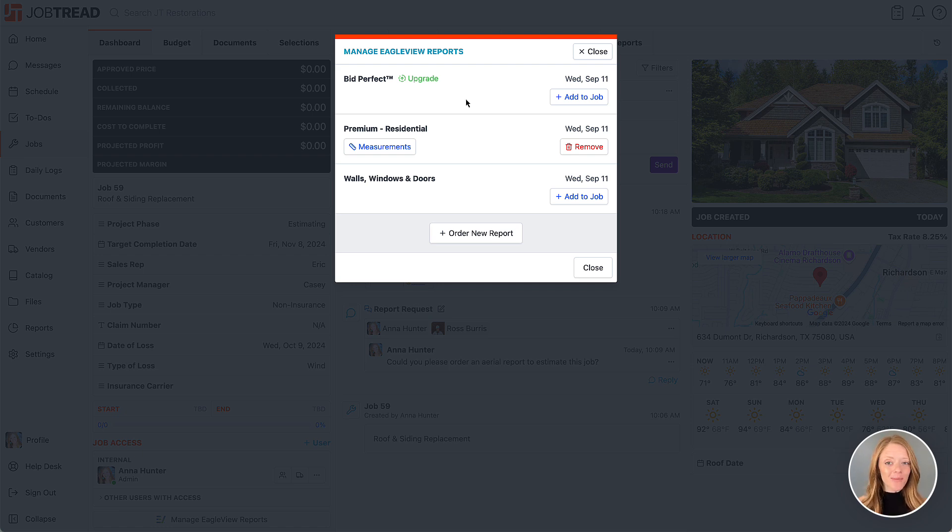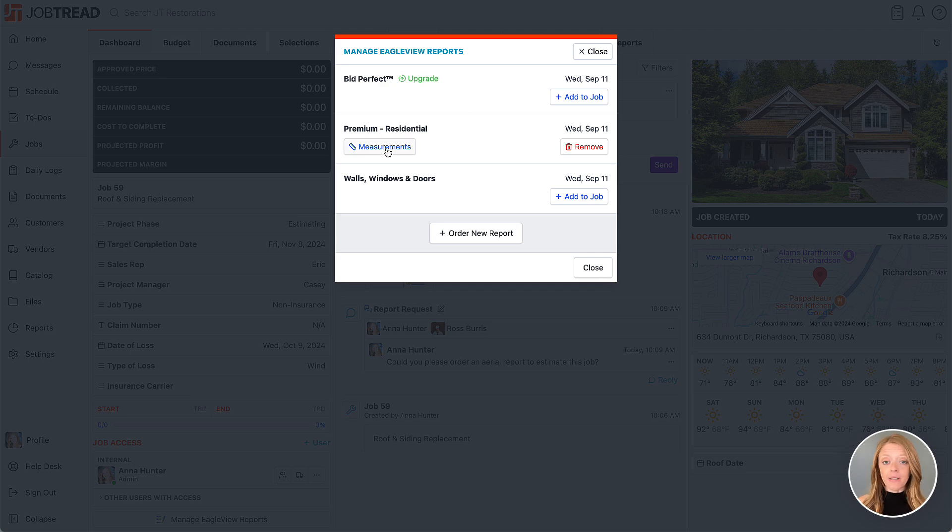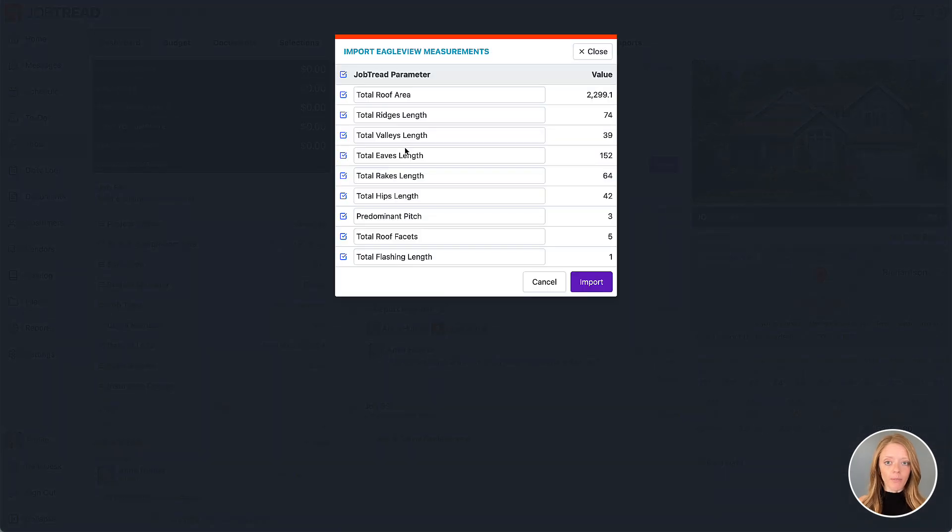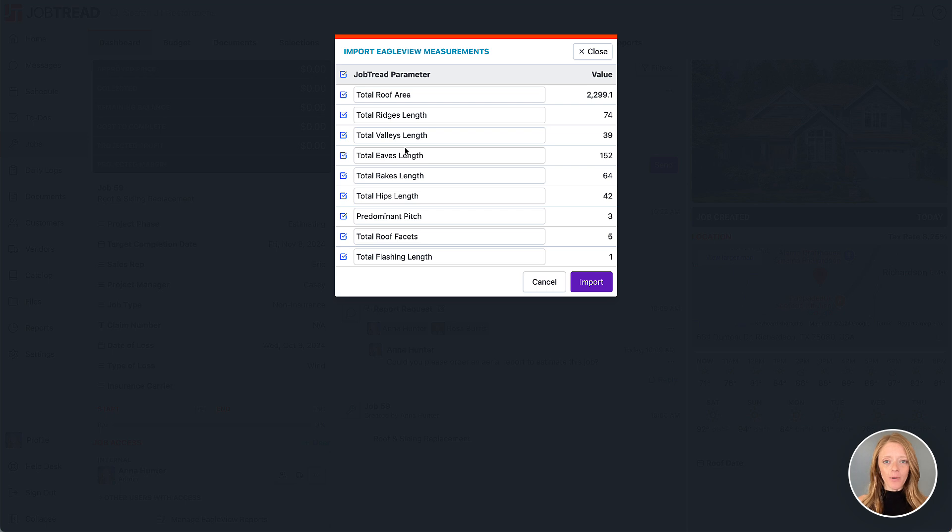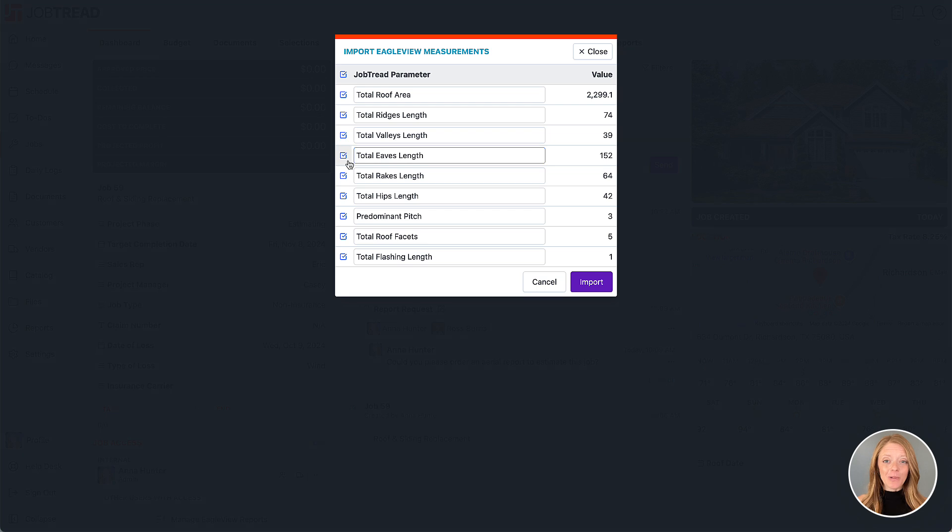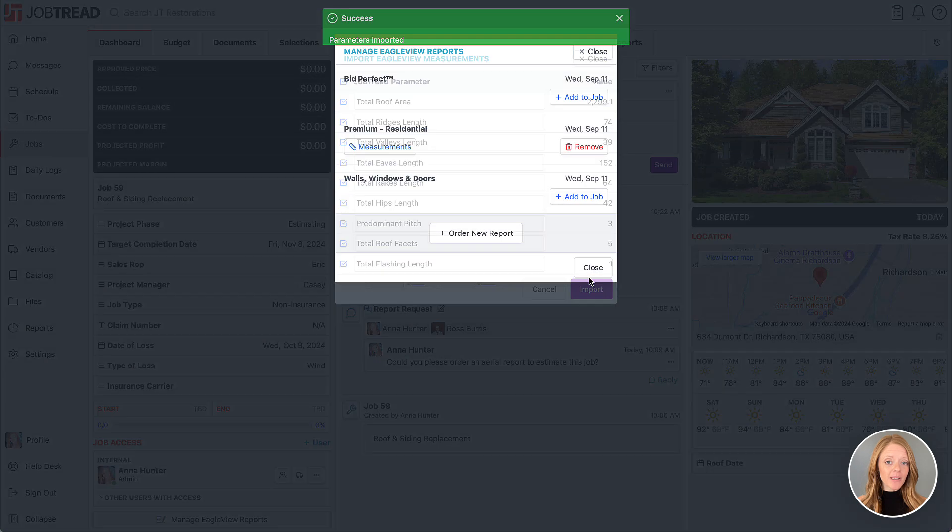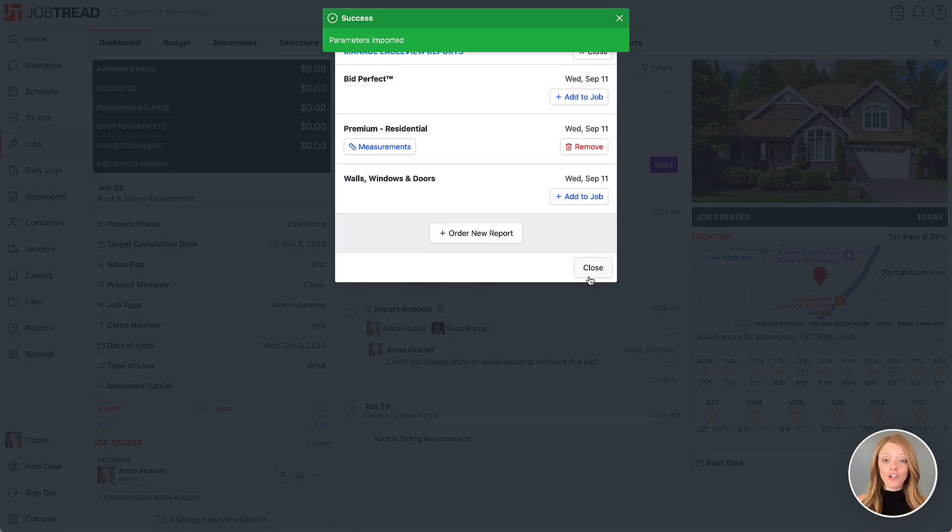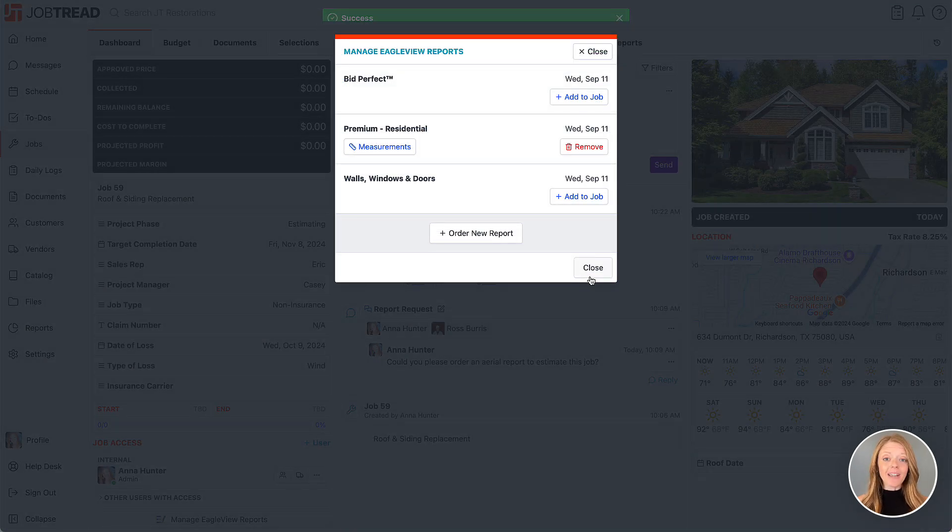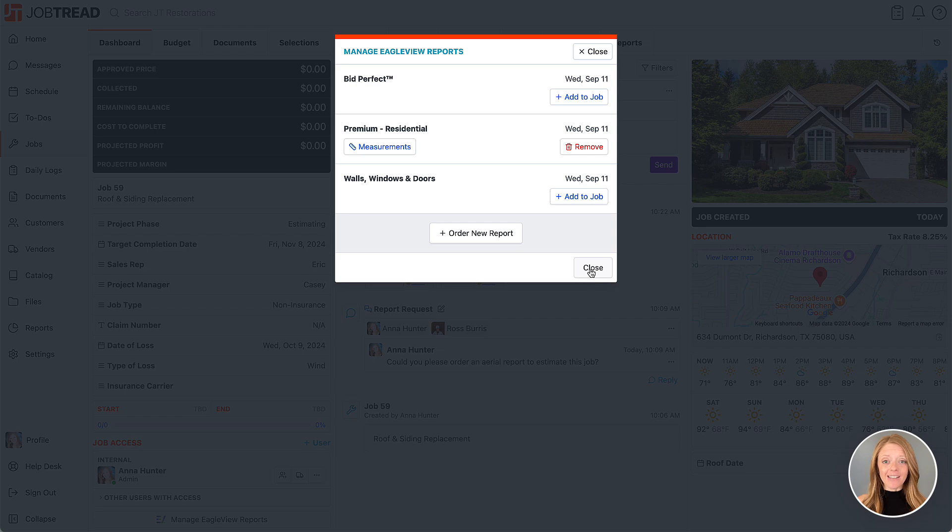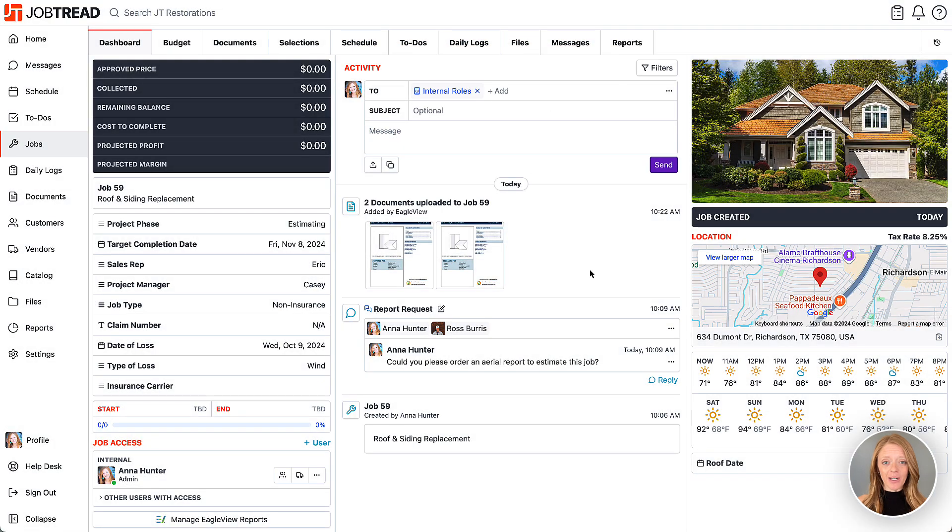To use the measurements from a report to estimate your job, click the measurements button near the report. Here you'll see all the data from the report, like roof and wall dimensions, ready to include in your job parameters. Choose the measurements that you'd like to include and rename them if you need to. Doing so saves the measurements to your overall job parameters list and allows you to use them in formulas so you can calculate your cost items in your budget.